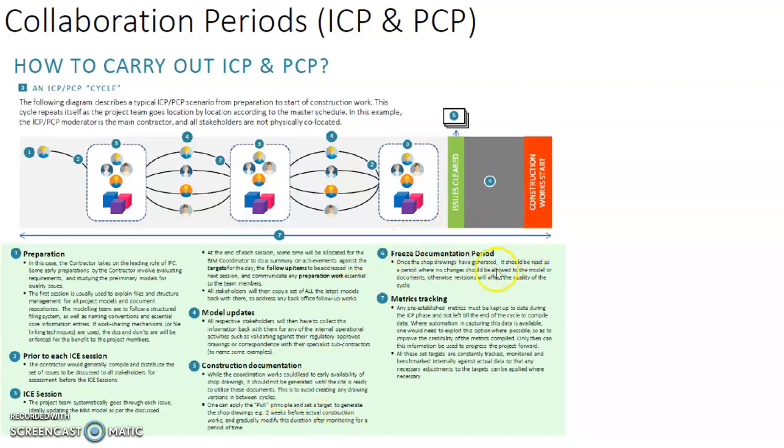The next stage is to freeze the documentation period. Once the shop drawings have been generated, it should be treated as a period where no changes should be allowed to the model or documents. Otherwise, revisions will affect the quality of the cycle.